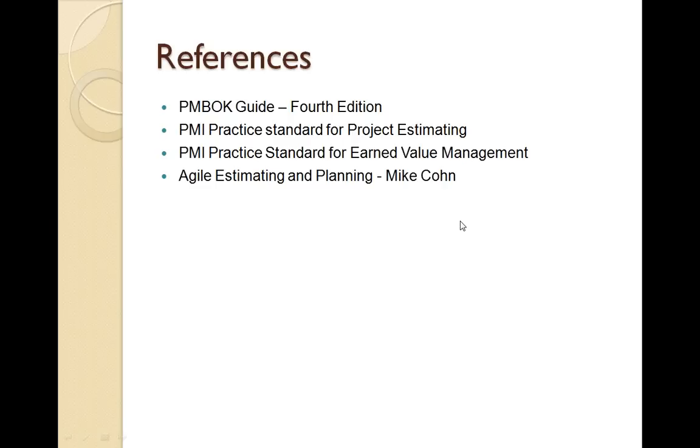Let's say a team lead says that this particular login module can be developed in 1 week, and let's say we are thinking of developing it in Java, but I have a team member who is a fresher and is not well acquainted with the technology yet, he will take some learning time. So if he does the estimation, he will say, okay, I might take 2 weeks to develop this same component. So that definitely has to be factored in.